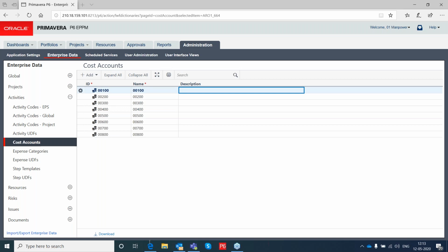So each resource has to put their time on a timesheet so that it is easy to track on what projects, at what area or what specific point they spend their time; that can be monitored and tracked. Yes, it's possible. But with this timesheet can we also track cost, or only time, project wise? For example, resource A spends the first 4 hours in project A and the second 4 hours in project B, and he just keeps on putting this data. At the end of the month, the project A manager can check how much time these resources spent, and the cost for the project he can derive. Yes, it's very much possible.